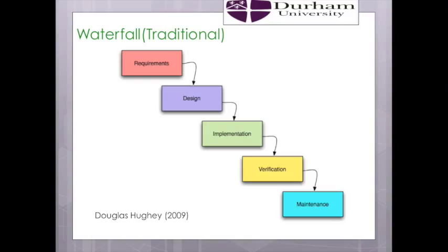Start from the requirement stage, as you can see, till the maintenance stage, and doesn't move to other stages until the previous stage is fully completed. As an example, the design stage doesn't start until the requirements are defined during the requirements stage. Also, the structured approach of this methodology makes it easy to measure the progress and define clear milestones for each process.